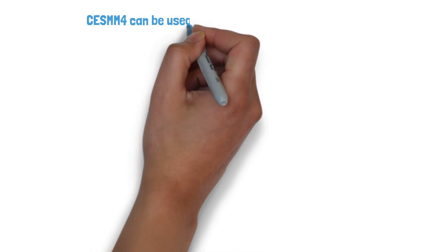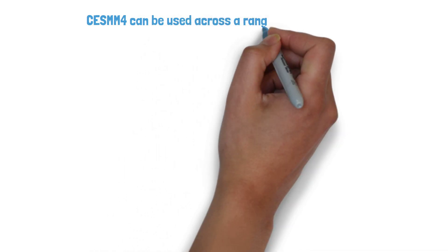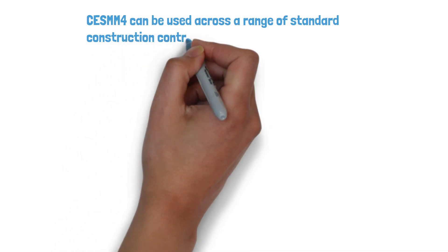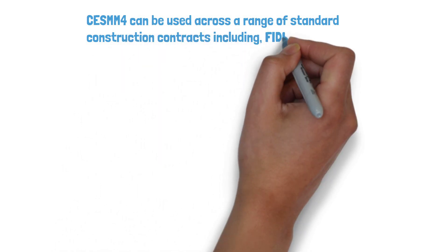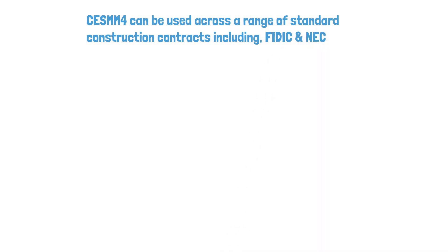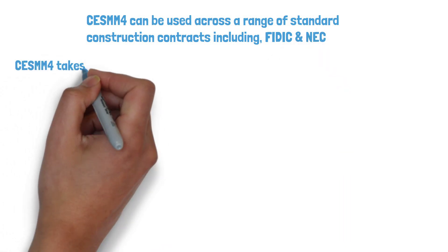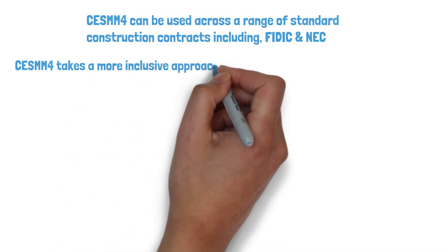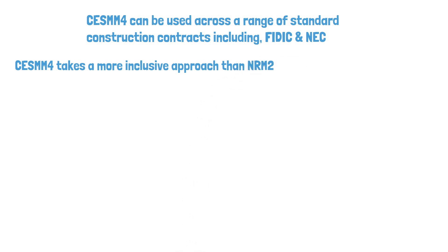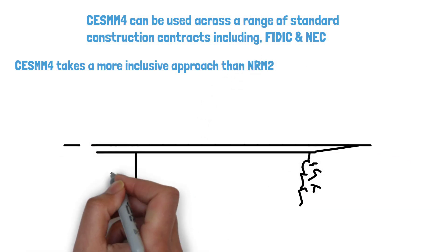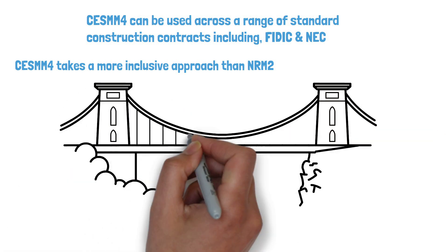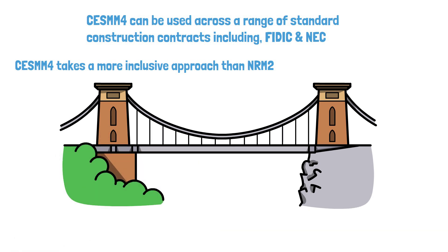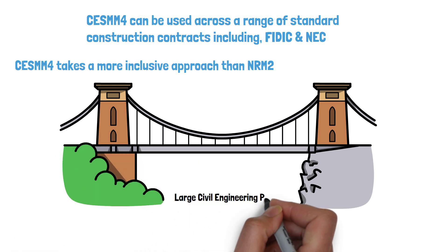Like other methods of measurement, such as NRM2, CESMM 4 can be used across a range of standard construction contracts, including FIDIC and NEC. The difference between NRM2 and CESMM 4 is that generally NRM2 gives more emphasis to detail, whereas CESMM 4 tries to take a more inclusive approach to the measurement process. This is due to the nature of the work that has been developed to guide civil engineering, as building work comprises many different trade types versus civil engineering works that generally consist of large quantities of a comparatively small range of items.